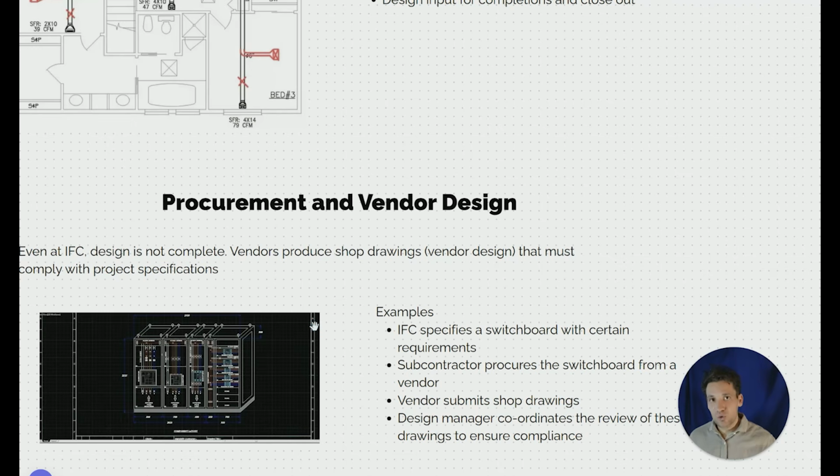This set of drawings will also need to be approved and checked by the design team or the design manager, depending on their capabilities. The design manager needs to coordinate this review to ensure the drawings comply. And quite often when you get to the vendor design stage, you'll actually start to identify some issues with the core design. So it's an incredibly important stage, and it very much applies to material suppliers.